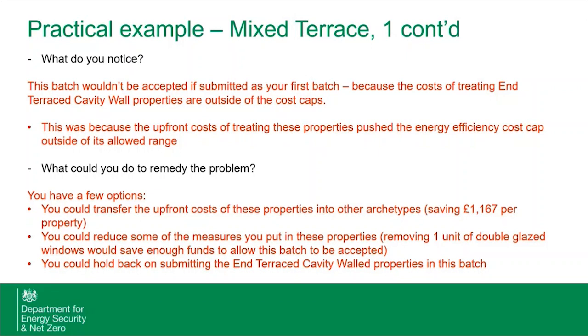Yeah, so when I say you can remove a measure, you can do one of those things. What I imagine the pathway is, obviously you have your upfront cost, you know what that's going to be. You then have a remaining pot of money that's left for those homes to treat them based on the spend you've done to date so far. With that, you would go and get a medium-term plan done. You'd have a retrofit assessment, and that would provide you with a set of costs based on the recommended measures. From there, before those are offered to the household, you'd obviously decide which ones are cost effective and you think that they would do. And obviously there's some back and forth about what they're able to take.